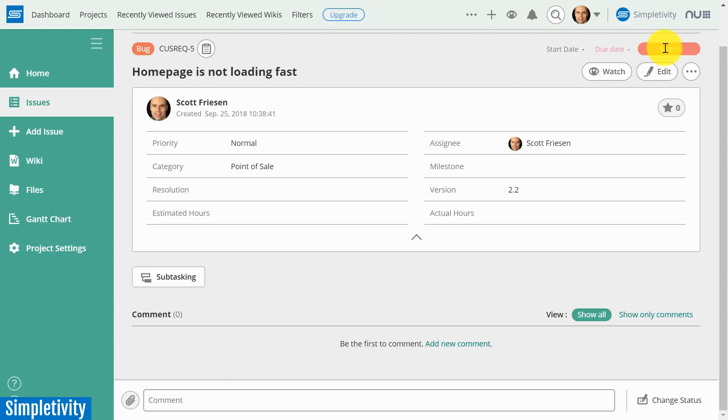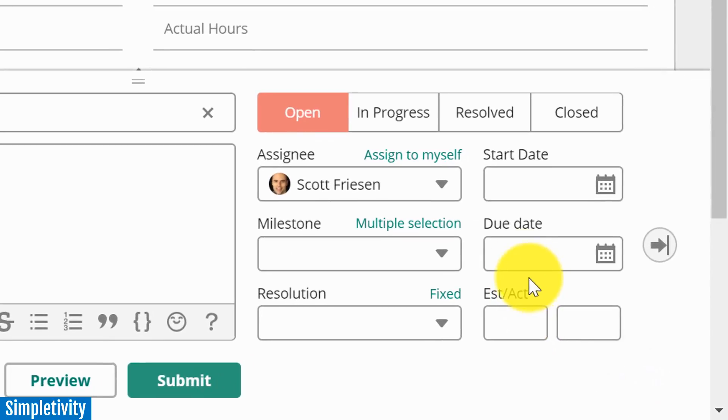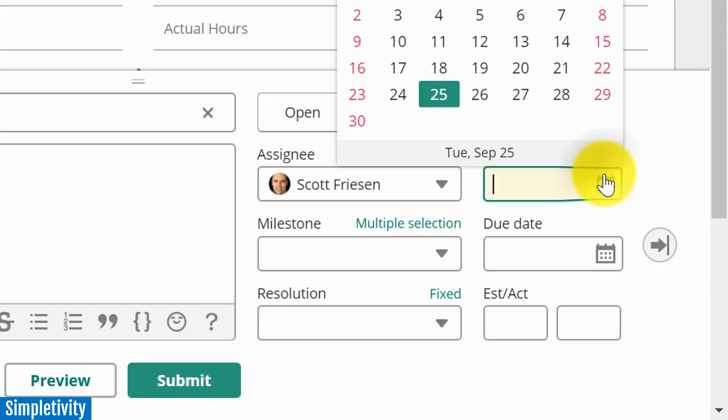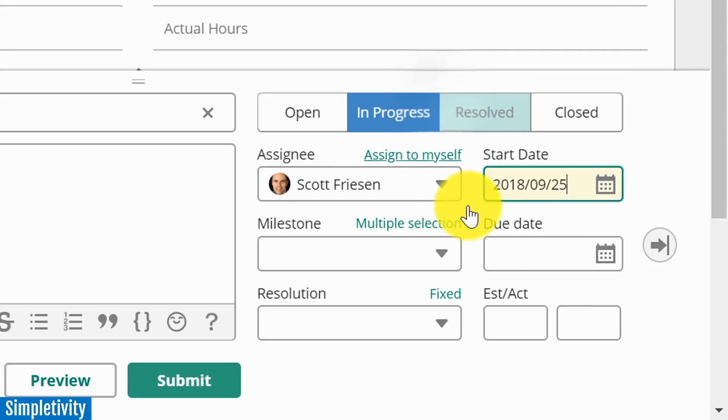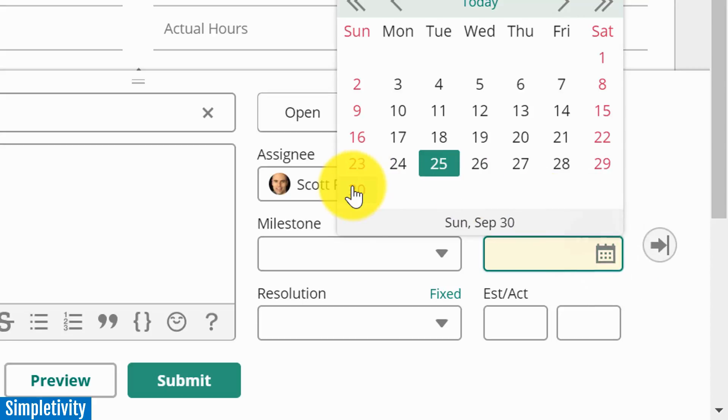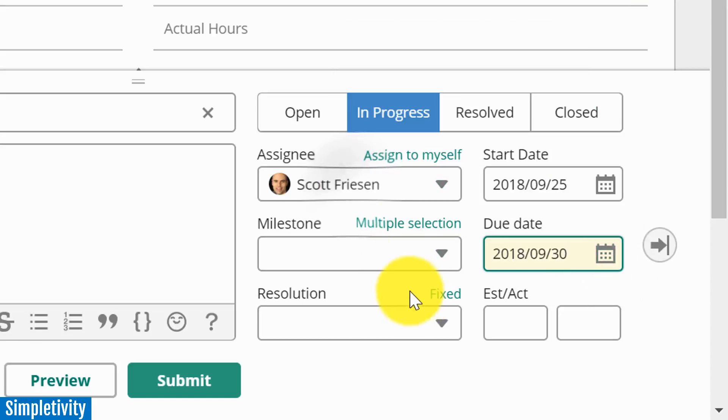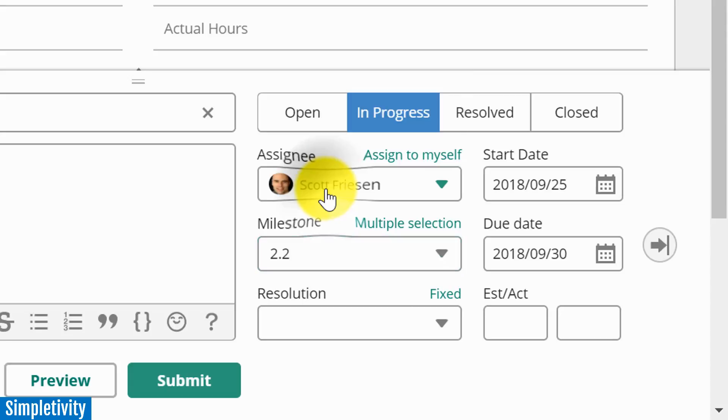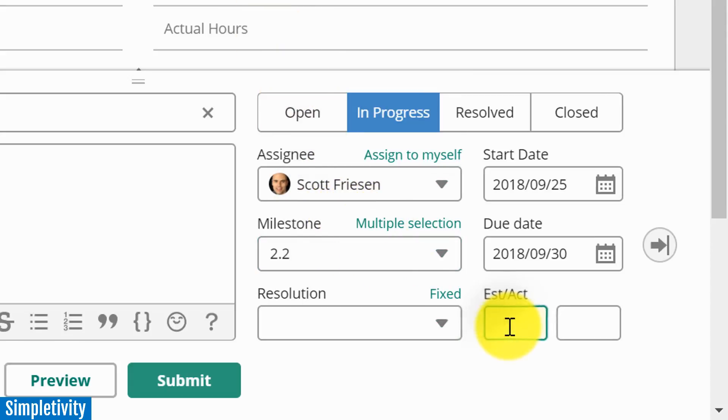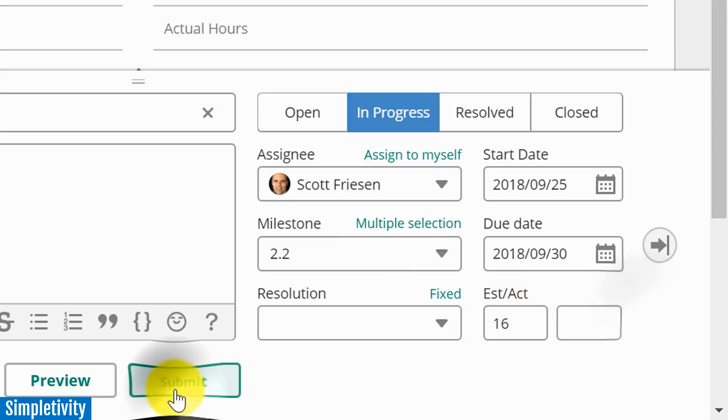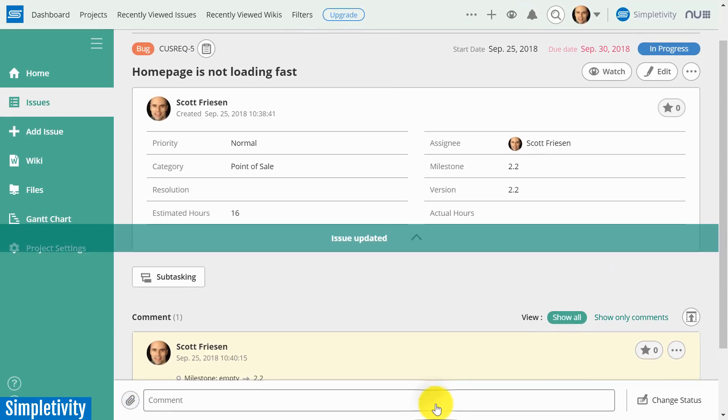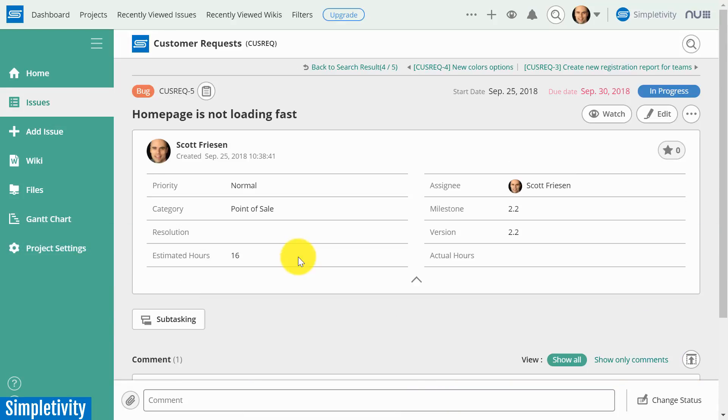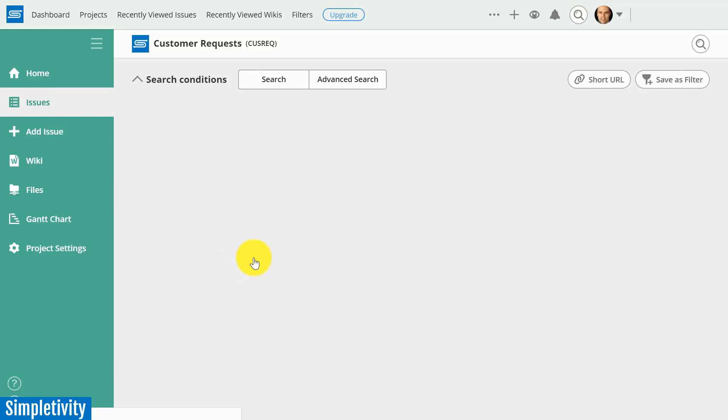And in this case, it's only been opened at this stage. So let's change the status at this place. Let's say it's in progress. Again, I've got all this information right in front of me. I don't have to go scrolling up and down or to the left and right. I can say this is in progress. I started this today. We don't have a due date yet. Well, let's make sure we have it done by the end of the week. Let's make sure there's a milestone attached to it as well. And of course, your milestones and your version numbers can be different. I'm going to estimate that this is going to take me 16 hours of time to do. So I'm going to submit that issue. Things are updated immediately, of course, as we would expect it to. And then we can go back to that issue screen.